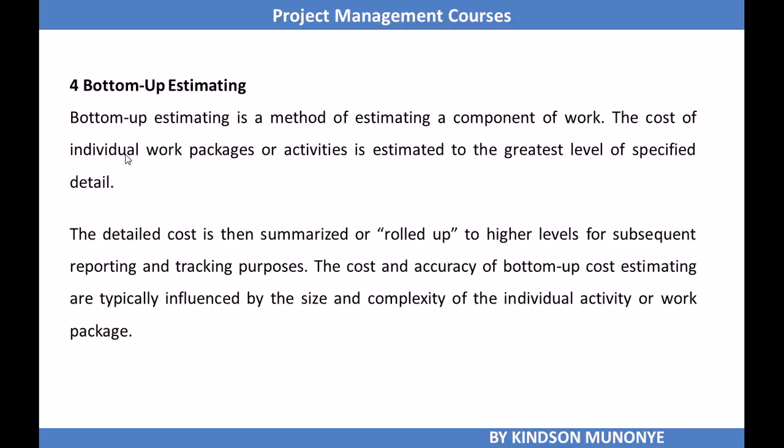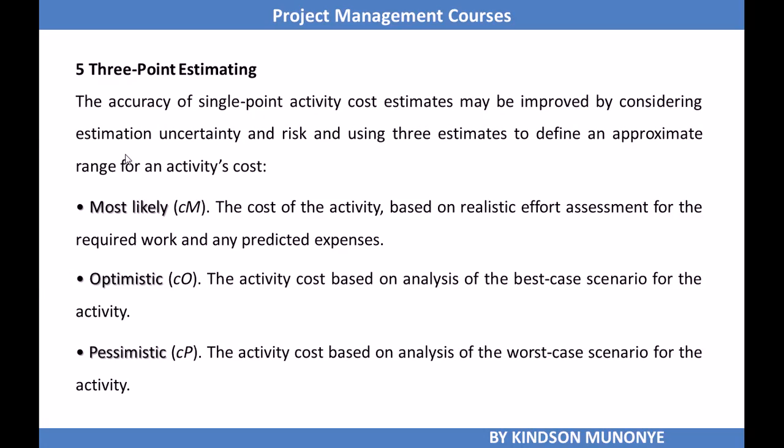Bottom-up estimating means estimating costs at a lower level and then aggregating it or summing it up to higher levels. The detailed cost is then summarized or rolled up to higher levels for subsequent reporting and tracking purposes.